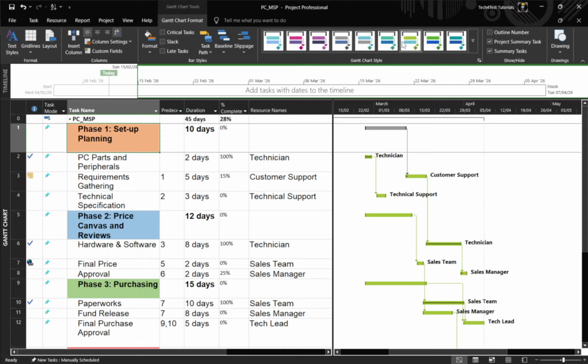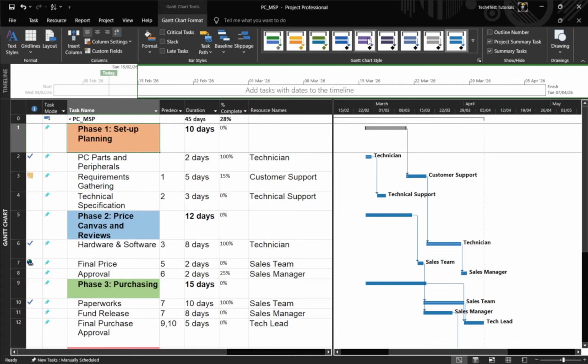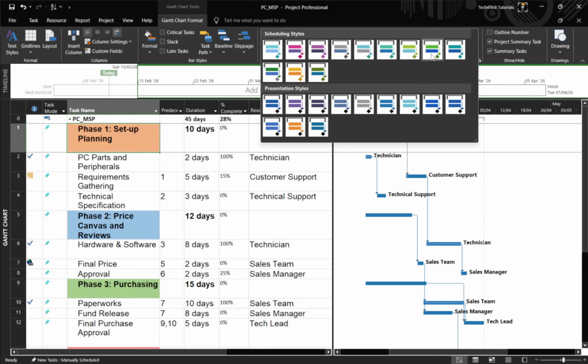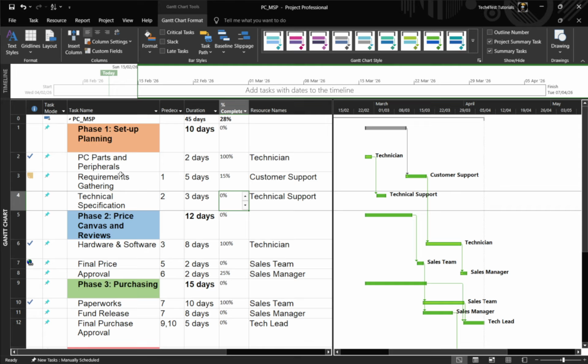In the Bar Styles dialog, scroll the list to find the bar category you want to modify, such as Task, Milestone, or Summary. Select it, then open the Bars tab at the bottom. Here you can set the start, middle, and end shapes, pick colors, and choose patterns. Click OK to apply your choices across that entire category. A quick note: some categories, like milestones, only offer a start shape rather than a full bar body, so you'll see fewer options, and that's expected.